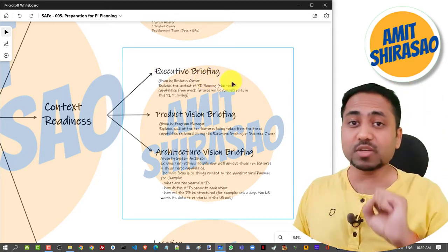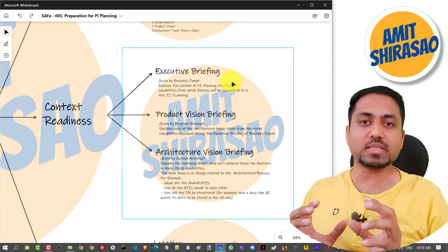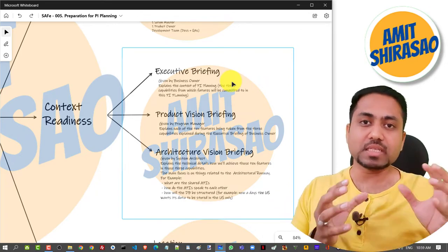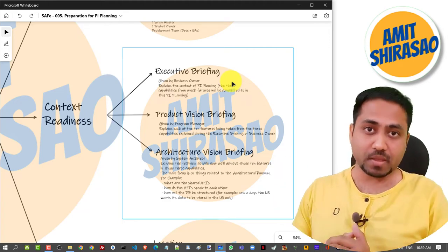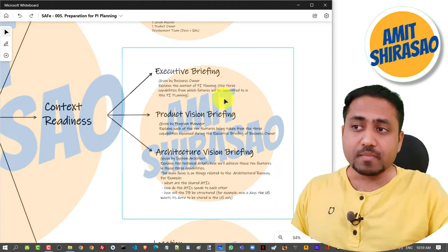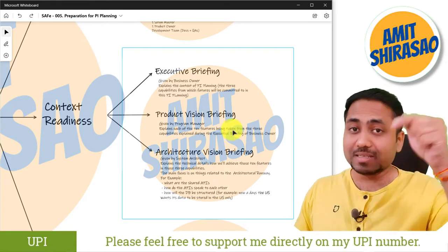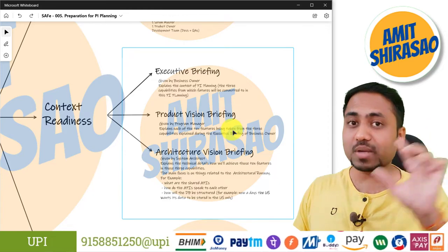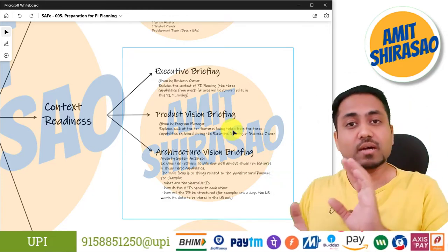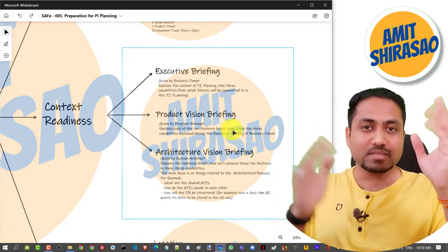In this executive briefing, he will explain those 3 capabilities that we are most probably picking up in this PI planning meeting. So he talks at the capability level. Then the product vision briefing is given by his junior, who is the program manager. And the program manager talks about all the 10 features inside these 3 capabilities.